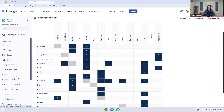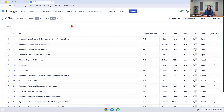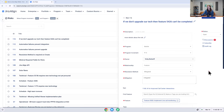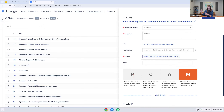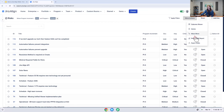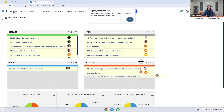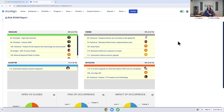We also have a risk management module in Jira Align. Jira Align uses the ROAM method — supported by the SAFe framework — of marking a risk as resolved, owned, accepted, or mitigated. We can add risks into the tool and link them directly to work items such as features to understand where we're experiencing risks throughout a PI. There's also a risk ROAM report where you can drag and drop risks across these categories during PI planning events to see how we are going at resolving risks — are we accepting a bunch, are we mitigating, where can we improve?